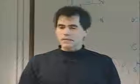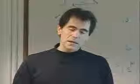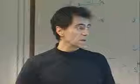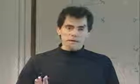And so, as is typical, the iteration process begins with headquarters to change the parameters of the mission, to, in a sense, compromise the scientific objectives a little bit in terms of implementing a requirement set. And the result is, finally, you get something that you can pay for and that still meets the intent of the scientific objectives. So that's a key lesson to learn: when you're first starting out and you're first crafting what you want to do, expect it to change. And the key there is it's usually cost-driven as to what you can afford.